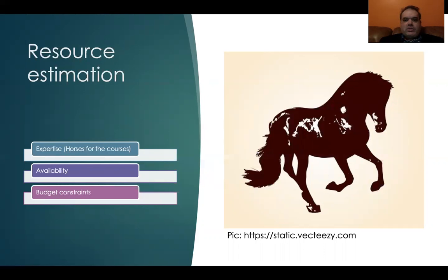The second thing was, when are the resources available? Are the resources available when the task is on the schedule in the project plan, or are we going to change our task schedule based on the availability of the resources? We basically made sure our schedule matches with the schedule of the resources.